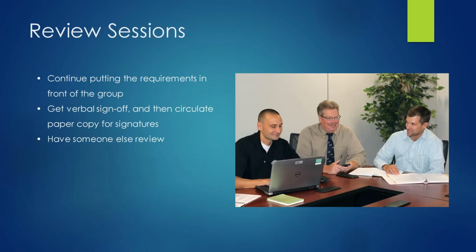One approach is to wait until everyone gives a verbal sign-off on the requirements, and then wait a few days before circling back up with everyone to get their signature on a formal document where you can ask them to take a quick look again, just to be on the safe side. Another approach is to have someone else in the business with knowledge around what you're doing review the requirements to make sure that everything appears as airtight as it can be.